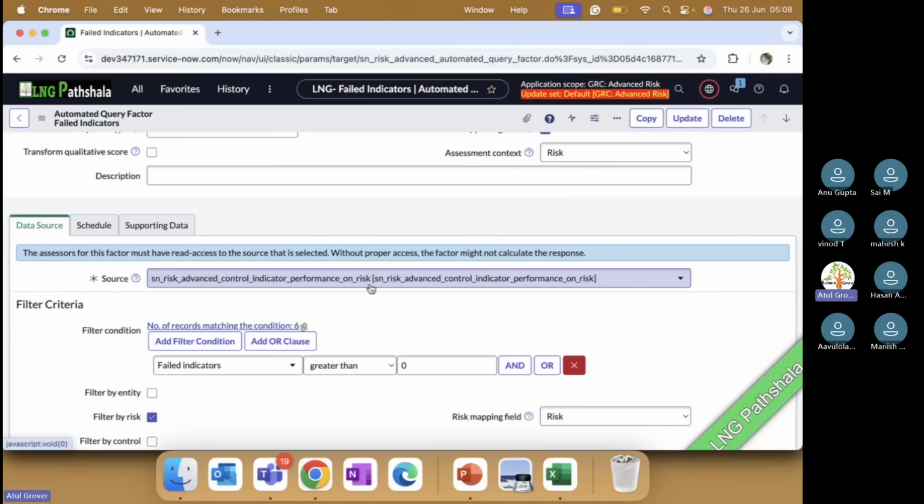This is something like, if you remember in change, we have risk conditions. If you just click on calculate risk, a few things are done automatically. There is one condition called lead time: if the lead time is less than 3 days, then it will be a high risk. Do you tell the system that the change is getting released in 3 days?